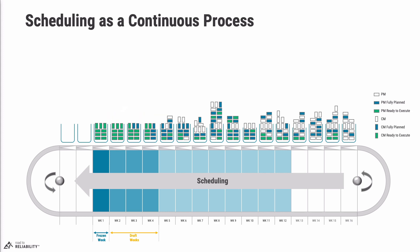One important scenario is what happens when emergency work breaks into the frozen week. We'll have work that was ready to execute that we don't complete, and because emergency work is planned on the fly, we execute it with lower productivity — a job that would take two hours if fully planned can easily take six or eight hours as we scramble to get isolations in place, find materials and parts, etc. This means rescheduling a lot of work out of the frozen week into week 2, then from week 2 to week 3, and from week 3 to week 4. You can see the ripple effect a single emergency job can have — this is another reason why it's so important to protect your schedule and keep emergency maintenance to an absolute minimum.